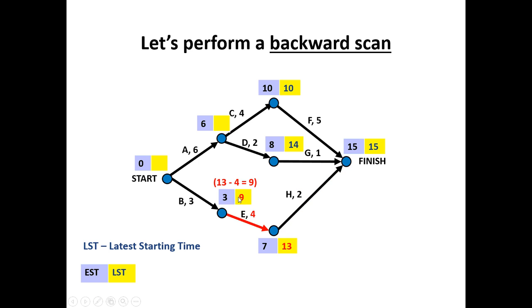Thirteen minus four gives me nine. Ten minus four gives me six. However, you'll notice, if we're working backwards, there's activity D to consider as well. Fourteen, take two, gives me twelve. Now I've got two options here. When we're performing a backwards scan, instead of taking the largest value, we take the smaller of the two. So always pick the smaller option, so we choose path C, which is six.